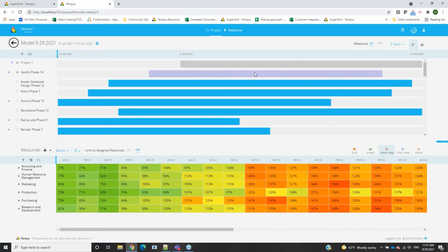It's just going to be locked in place, just to make sure that maybe this is a project that needs to happen from these two certain dates. Maybe this is a project you don't even include in the model itself. Maybe it would be a project that you bring over as unsimulated because you know you're not going to make any changes. It's also a good way, as you're working through and making your changes, to lock something so that you just don't accidentally move it, or if an error happens, you don't move a project out that shouldn't be moved.